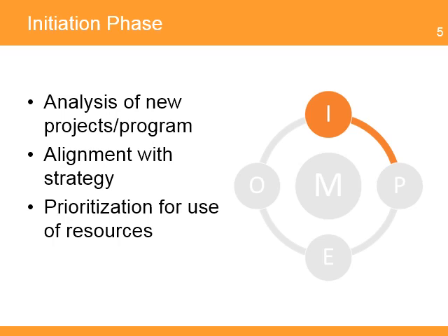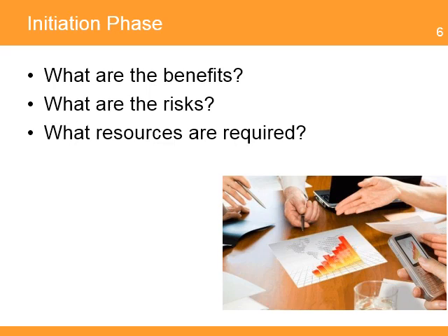During this phase, the portfolio manager will apply a set of criteria to help evaluate each new project, idea, or initiative. The criteria helps rank each project and facilitates approval and prioritization of organizational resources. Organizational resources may include human resources, financial resources, equipment, and other assets. This process will produce a list of components that represent the best value for the organization based on the available capacities. For example, a new idea for a water and sanitation project is presented by a program manager.